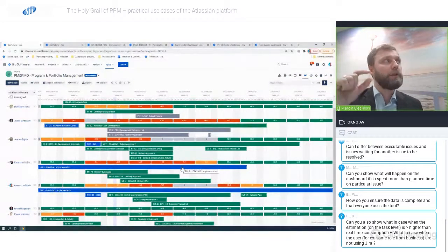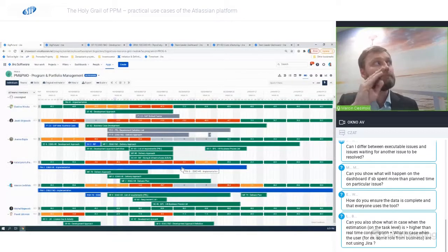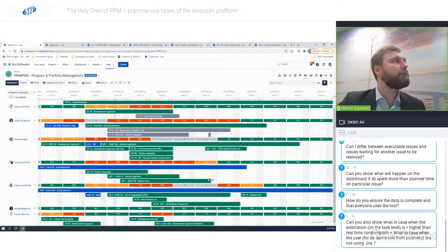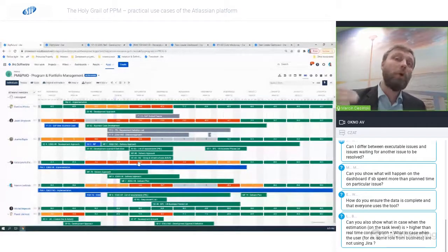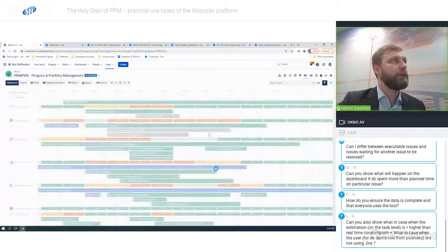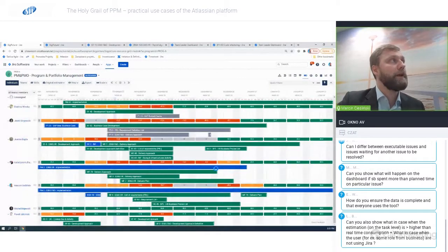So this is a great simulation for me to understand, okay, if I prolong the delivery plan by 3 weeks, actually I prolonged it by 2 weeks, let's prolong it by a week more. If I prolong it until the end of the year, well, Katarzyna is still over allocated, but her over allocation is not as big as it used to be. Okay, so what else? Well, maybe we can prolong another task for her, right? All right, so she's still a little over allocated, but not that much.